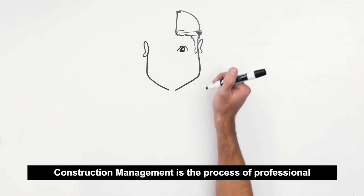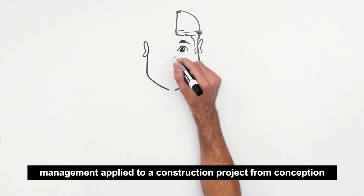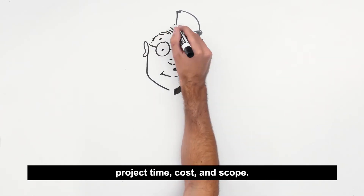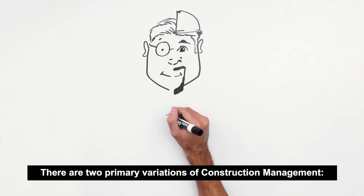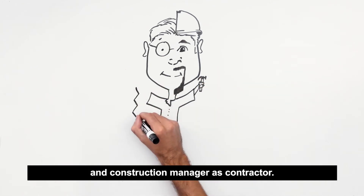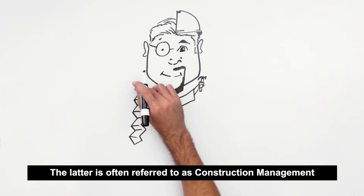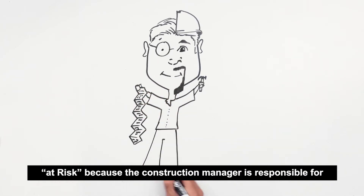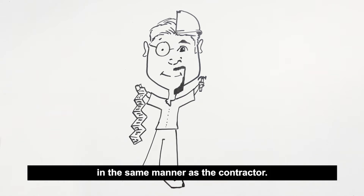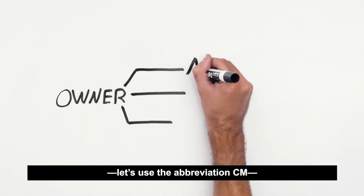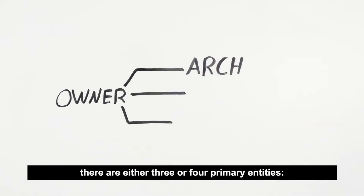Construction management is the process of professional management applied to a construction project from conception to completion for the purpose of controlling project time, cost, and scope. There are two primary variations: construction manager as agent or advisor, and construction manager as contractor. The latter is often referred to as construction management at risk, because the construction manager is responsible for the completed project and bears the financial risk in the same manner as the contractor. When an owner chooses the construction management method — let's use the abbreviation CM — there are either three or four primary entities.